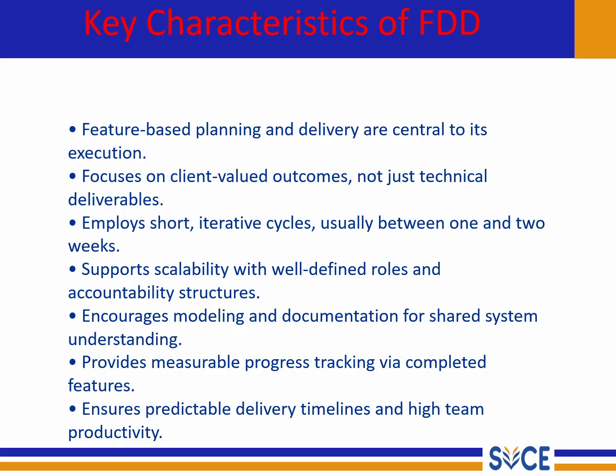FDD also encourages modeling and documentation. This ensures that everyone shares a common understanding of the system. It's not just about writing code, it's about visualizing and communicating how the system works. Another strength of FDD is its focus on measurable progress. Teams track success by the number of completed features, which gives a clear and tangible measure of the advancement.